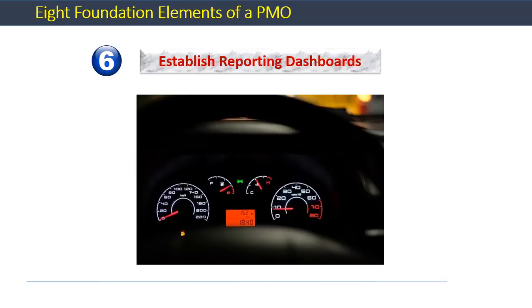The dashboards, therefore, are a crucial tool for decision making. These dashboards can include information on project performance and KPIs, overall project status, milestones reached, delays, schedule and cost information, risks that the project is facing, ongoing issues, their resolutions, etc. Since the amount of information that can be presented in dashboards is large, it's important to only provide relevant details based on the PMO's and project's goals and objectives rather than flooding the reports with irrelevant information.